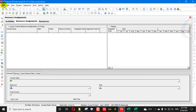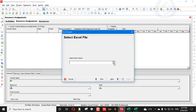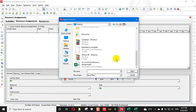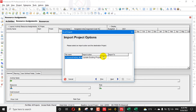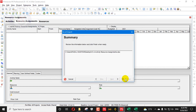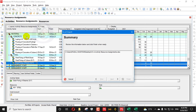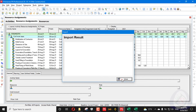In Primavera P6, I can see there is still no resource assignment. I will go to Import, select the XLS file from the desktop that I previously exported, press Next, select Resource Assignment only, choose Update Existing Project, select the villa construction project, press Next, then Finish.